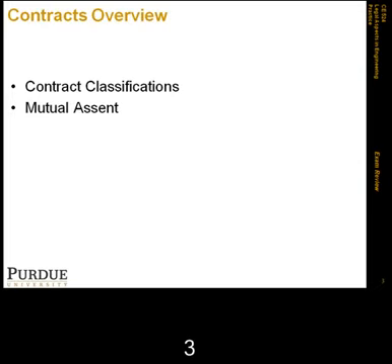There usually aren't any problems with expression of offer and acceptance if the parties are in the same location. However, if parties are at a distance, the offer and acceptance may need to be proven somehow. And then we needed to start to distinguish between an offer and a negotiation or a proposal process. The main difference there is that an offer creates something called the power of acceptance, where if you just go ahead and accept an offer, you have a valid agreement.